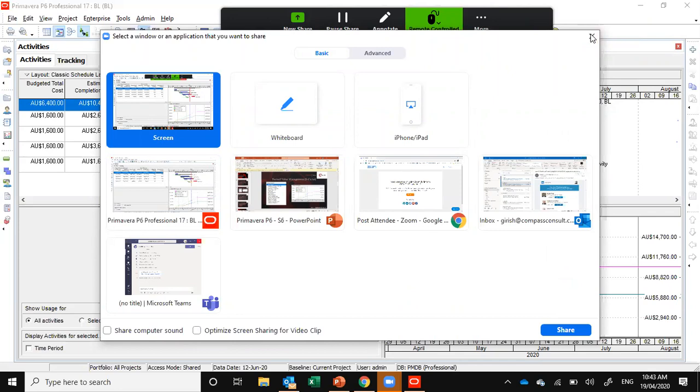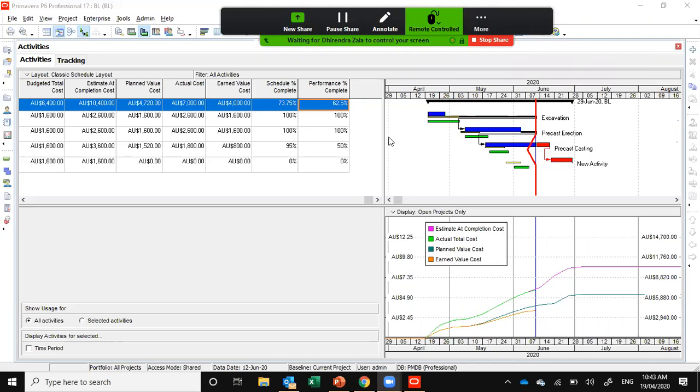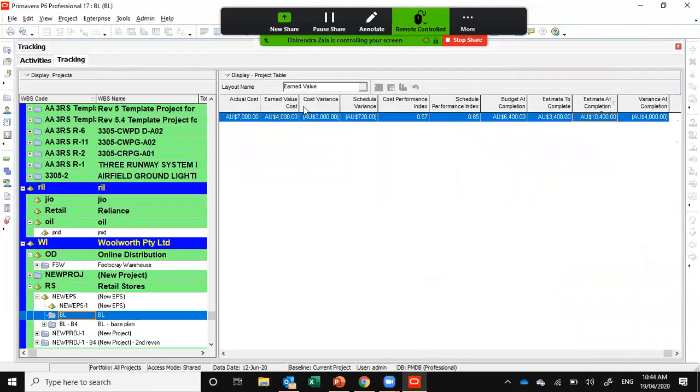I had divided my project into different activities in different phases, like engineering, procurement, manufacturing, installation, commissioning, and handover. Now I allocated some values to each of those activities, and when we track the progress every 15 days, if that activity is done, then we mark it achieved, and the earned value becomes whatever was planned for that.